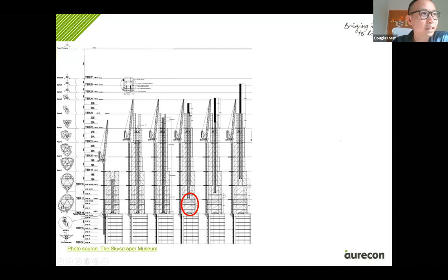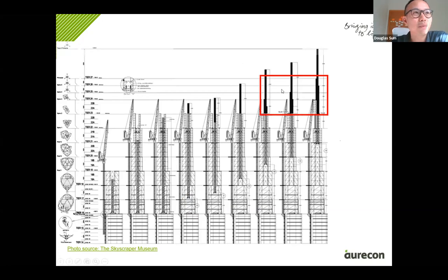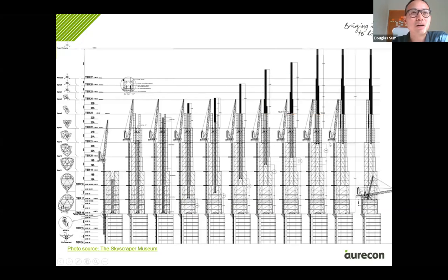So it's a chopstick, you install the cladding on the chopsticks, and then you start lifting up your pinnacle or chopsticks. You continue lifting up and then you keep installing the cladding on the top. So eventually the things are already on the top and then will be going higher. Yeah, so the cladding is riding on the free ride. Eventually these things keep going up. And then eventually you just fix this pinnacle back to the structure. And then this Superman can go down and finish his job.